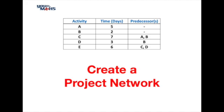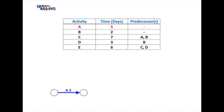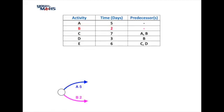Activity A and B have no predecessors, so we'll start first of all with activity A — that's just a simple line starting from the beginning. We'll use circles and label these as nodes within the network. Activity B will be the same, it comes off the beginning because there are no predecessors, so those are our first two tasks done.